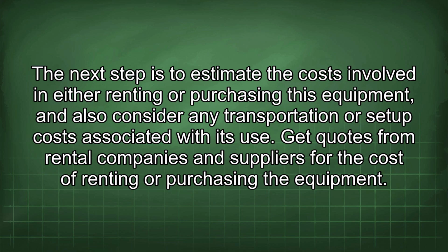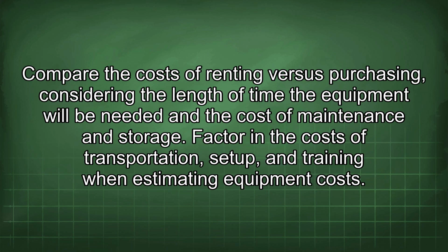Get quotes from rental companies and suppliers for the cost of renting or purchasing the equipment. Compare the costs of renting versus purchasing, considering the length of time the equipment will be needed and the cost of maintenance and storage. Factor in the costs of transportation, setup, and training when estimating equipment costs.